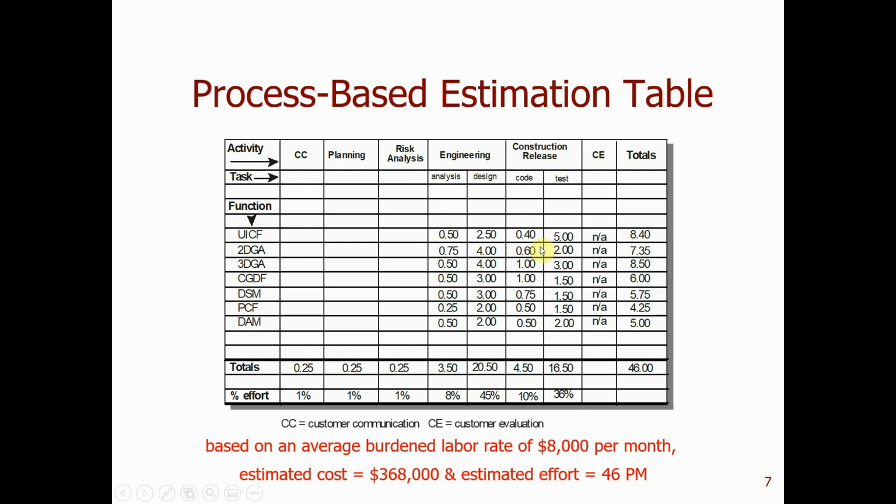So that's what we use to calculate the cost. When we calculate the cost, we are not actually using the dollar value. We use the person months, because using person months is more generic. We eliminate the location attribute: when you're working in India, the cost is different than working in the United States, where the cost will be higher.